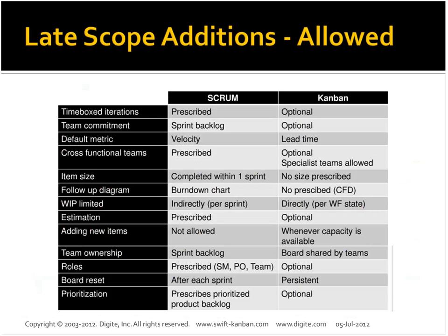Now this is a quick summary of what Kanban proposes versus what Scrum proposes. Some of the key points are that time box iterations in Scrum are definitely something without which Scrum is not qualified as a Scrum, whereas in Kanban it's still optional. You could do it. You could always do your sprint as you were doing, but it's not necessary.